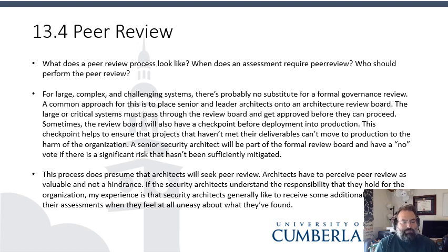This checkpoint helps to ensure that projects that haven't met their deliverables can't move to production to the harm of the organization. A senior security architect will be part of the formal review board and have a no vote if there is a significant risk that hasn't been sufficiently mitigated. And sometimes that no vote is actually a veto, not just a no, but one vote could be sufficient to keep something out of production.